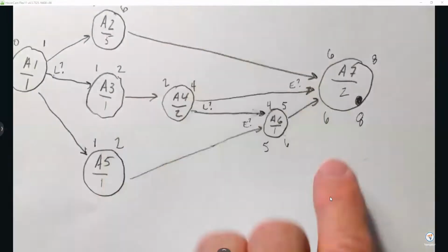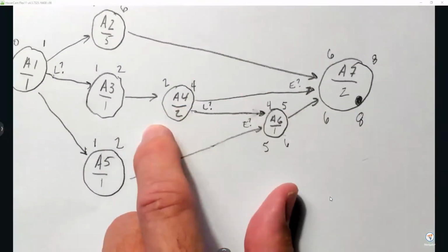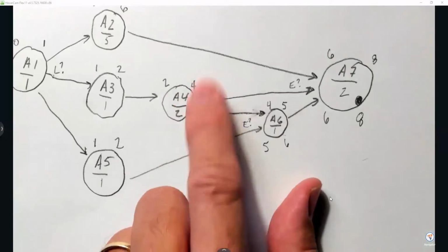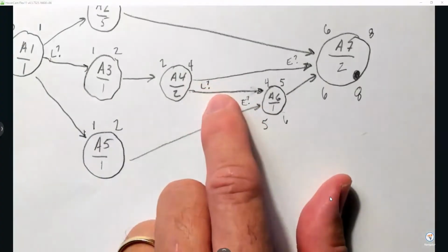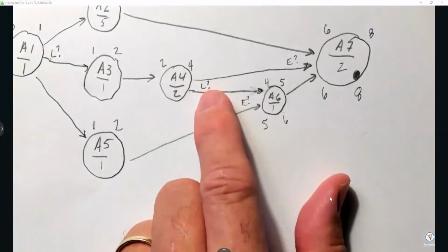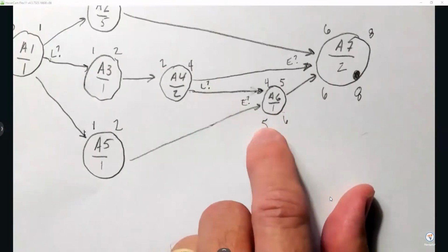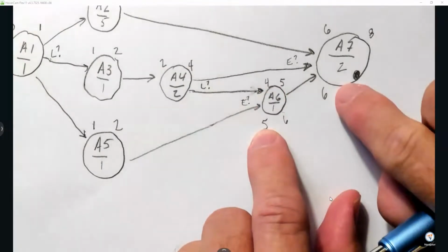And so you would have a tendency to say, all right, 6, I'm going to put 6 there, and 6 minus 2 is 4. That would be incorrect because you have to decide between 2 different L's. Remember, for the L's, you choose the smaller of the 2. So this one is 5. Remember, I'm not looking at the top one.